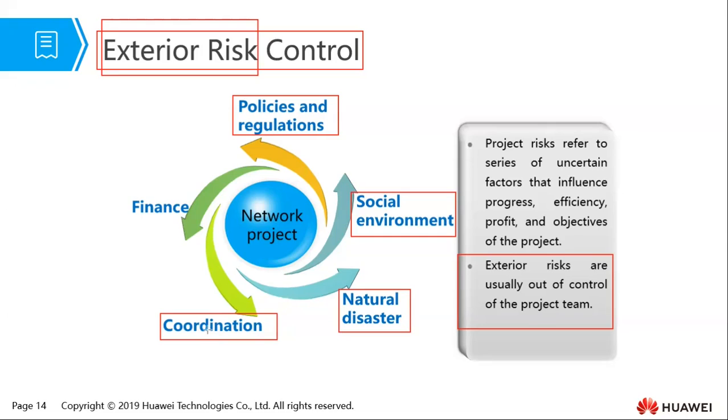I think you've seen this, for example, in some of the roads where we have an electricity pole in the middle of the tarmac road. Reason being, the project engineers tried to contact, for example, Kenya Power, so that they can come and move their pole, but they were taking forever. So those are some of the challenges that you encounter in terms of coordination. You have other parties that are not cooperating.